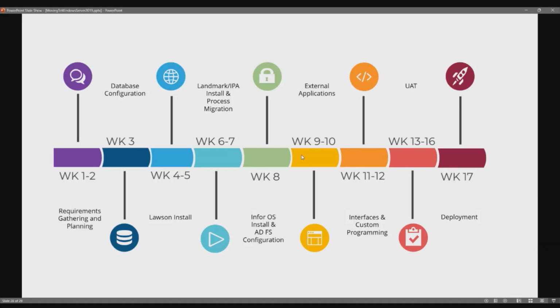So I think, Tan, you had a little bit something to add to the timeline. Yeah, I don't know if you mentioned this, but clients always ask, so how many hours of work is this? Based on several of these that we've done, and again it depends on complexity, you're looking anywhere between 400 to 600 hours of work for the entire project, man hours for everything. Now it could be a little less if it's a very vanilla move, or a little bit more if there are complexities and lots of different things to test. But that's just the general rule.